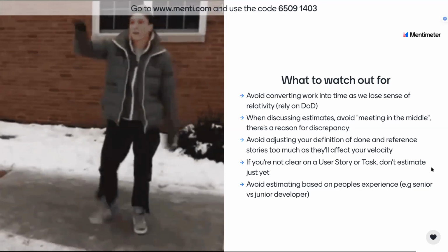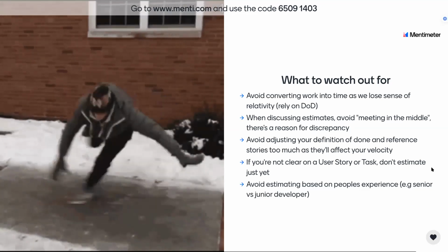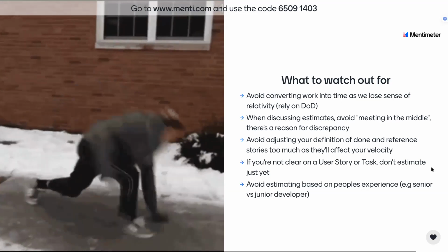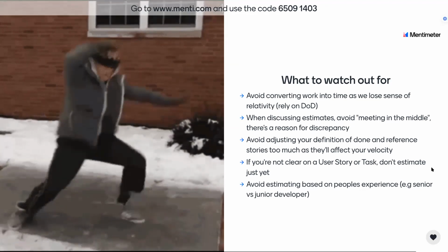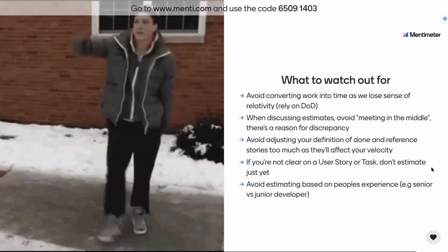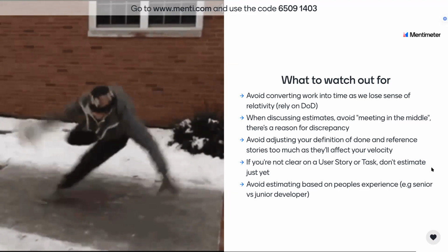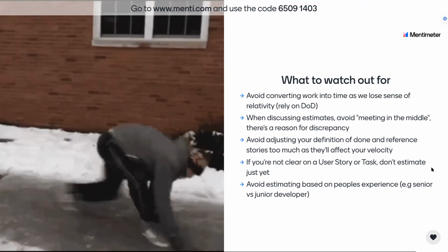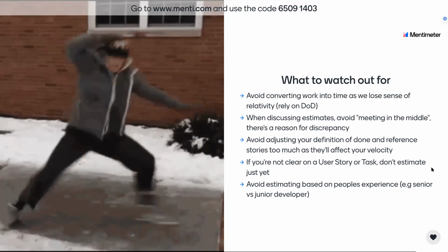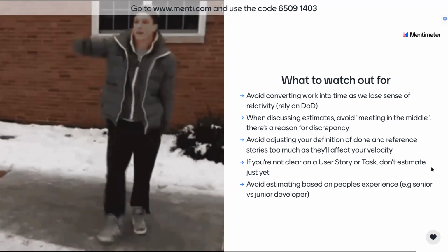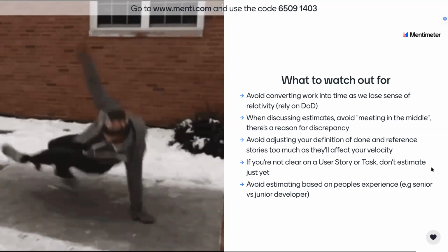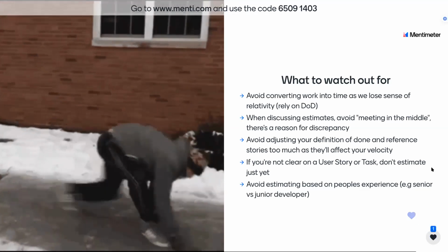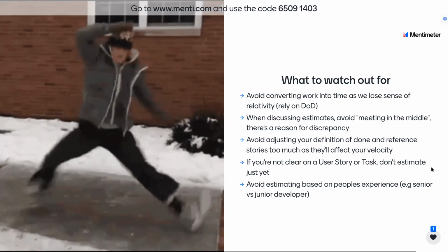Secondly, when you are going through this as a team, you might have different opinions. Nikita, you might say that this thing here is a 5. Ravi might say that this is a 2. You'll each have different reasons for that estimation. So again, have the discussion. Don't settle for the middle, which might be 3, but you've each got different reasons. And if you ignore those, then you're sweeping the issues under the rug. So have the challenging conversation, make it based on merit, and commit to something that you all believe in, because again, you can learn from that experience.